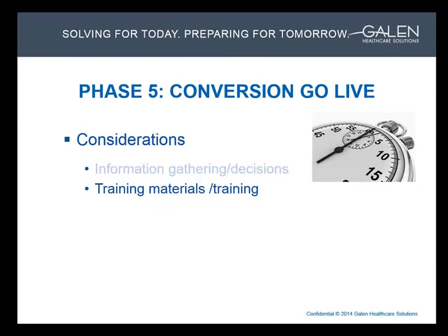At a minimum, making the conversion documents, which are the decision document, mapping workbooks, and issues lists, things that came out of testing, available in a central place, such as a folder on a conversion server, is a good idea, as these can be very valuable for reference. And then one more mention here, it's helpful to understand from the client whether the legacy EHR application will be available to end users at all post-conversion, even if in just a view-only capacity. Knowing this can help direct whether it will be necessary to guide the clients to preparing any reference materials or paper printouts or whatever that might be.